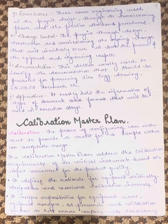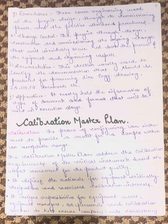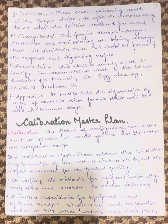Next is procedure. These cover engineering used in the project design through the commissioning phases and the facility's standard procedures. Next we have change control, covering the project through design, construction, and commissioning — the ongoing changes that will inevitably occur in both the process, equipment, and engineering aspects.